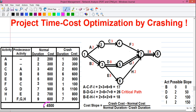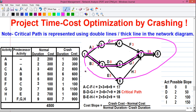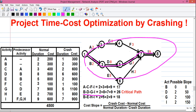The summation of all normal cost values is called the direct cost of the project, and we will use this in our calculations. Looking at the network diagram, we have one critical path: B, D, G, and I via events 1, 3, 5, 7, and 8. The total time duration for critical path B, D, G, I is 26 days.